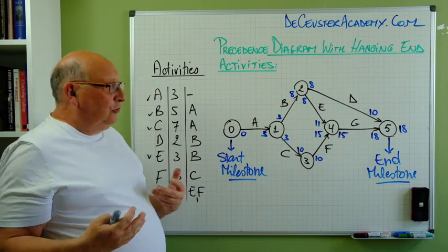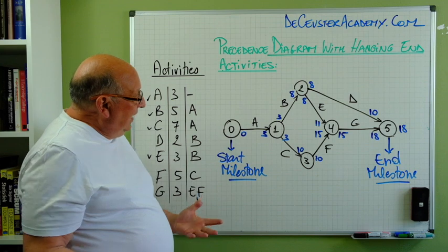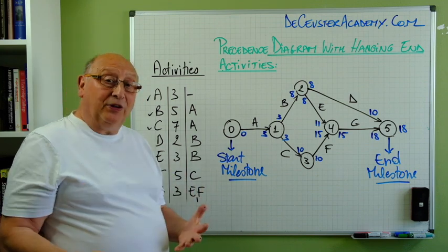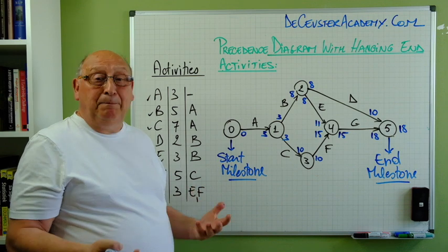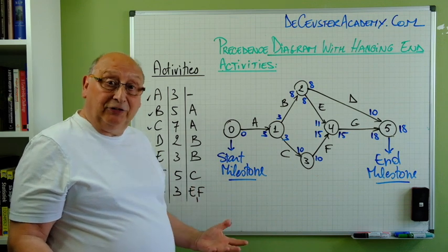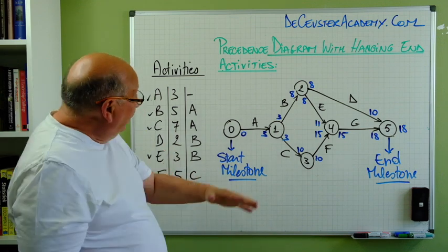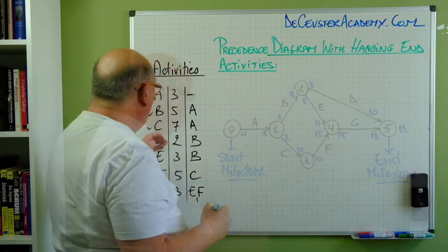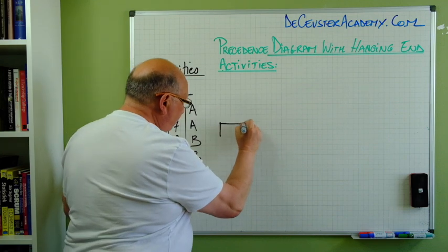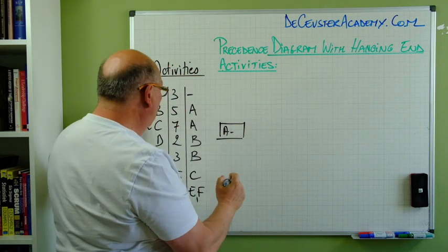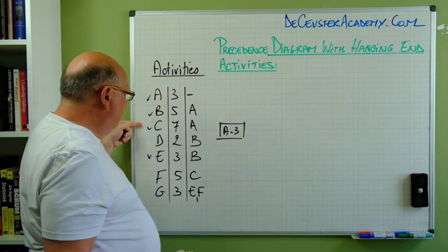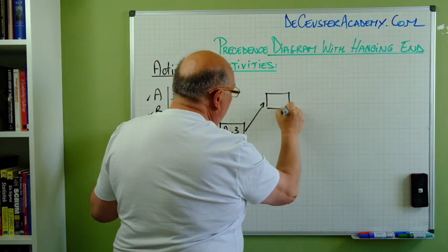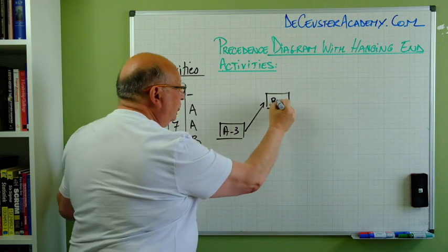And the thing is that people who see this network diagram and then see a precedence diagram will see some differences, and people react to it in a different way. So let's erase this and do the precedence diagramming method. So we start with activity A with a duration of 3. B and C are after A. So I have B with a duration of 5.